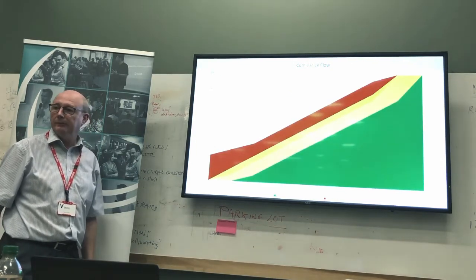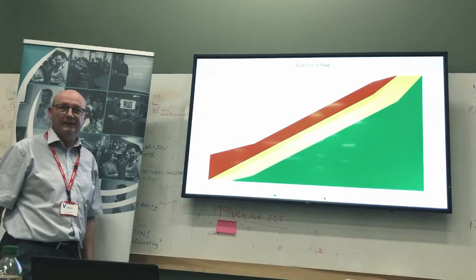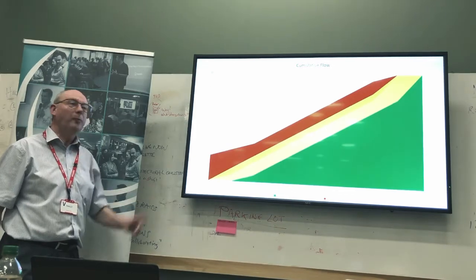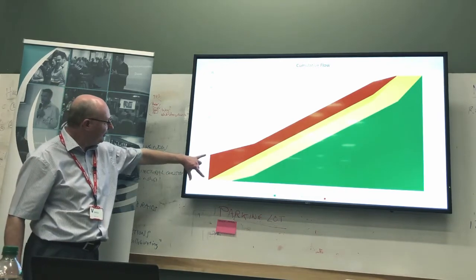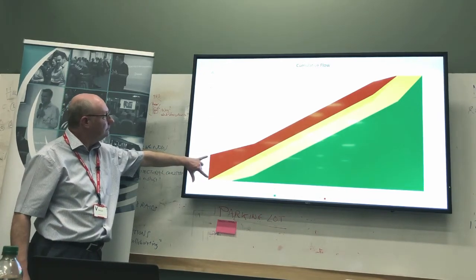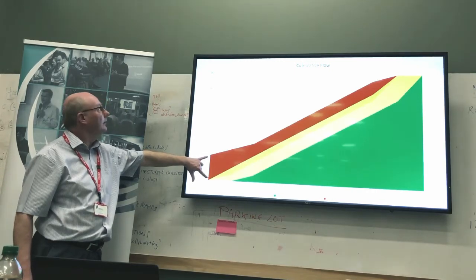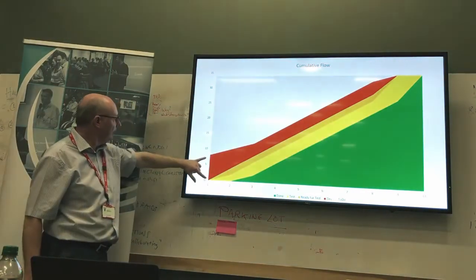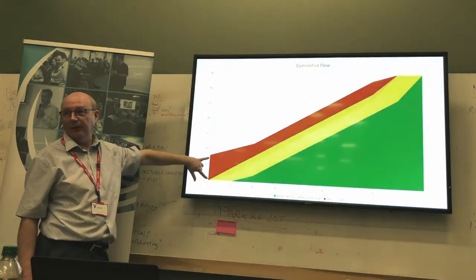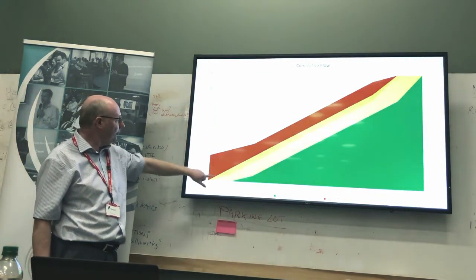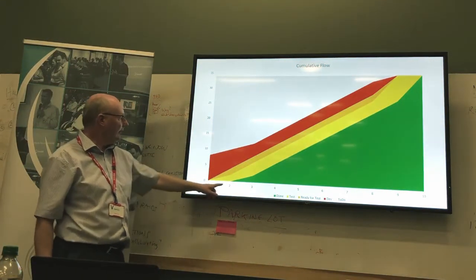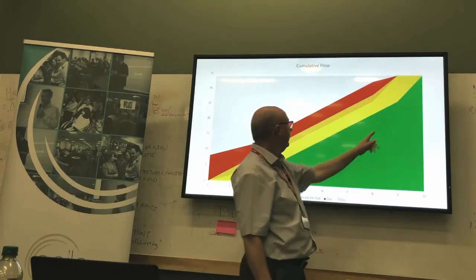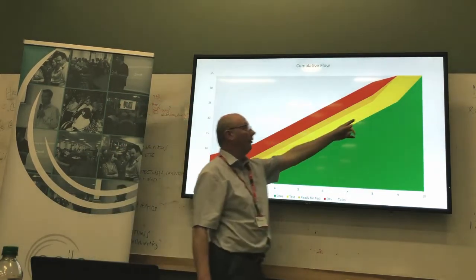What do you reckon to this one? Any ideas? Yeah, it is kind of a perfect Scrum pattern. Yeah. So you start your iteration with a load of stuff to do. All the work that's actually in progress is development. And then as you deliver some of that to ready for test, then the testers can start doing something. You deliver stuff, and at the beginning it's all dev, and at the end it's all test.